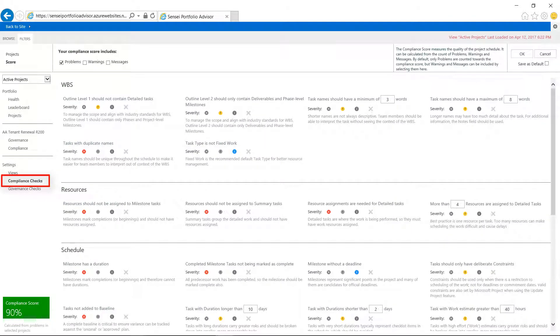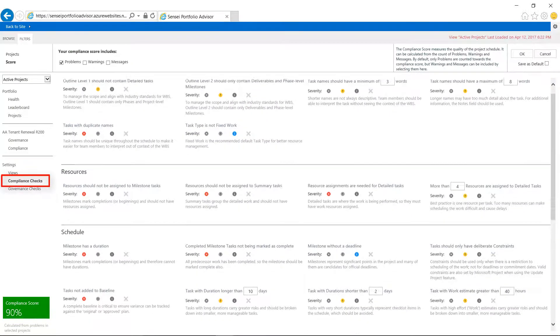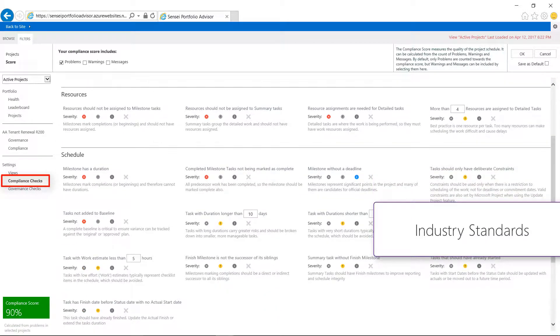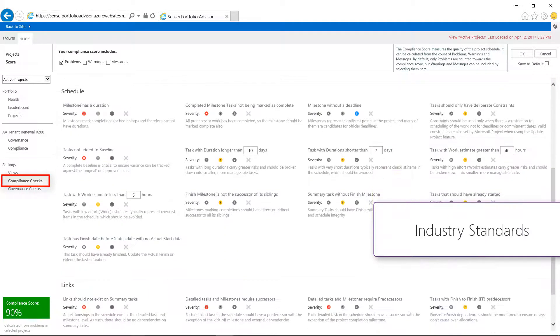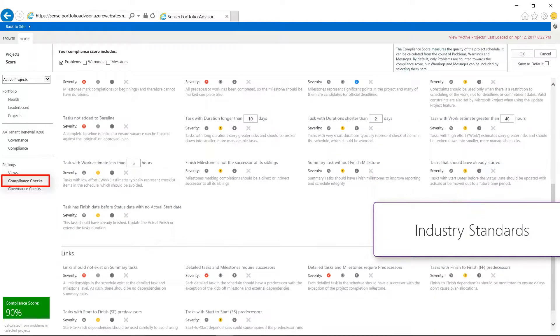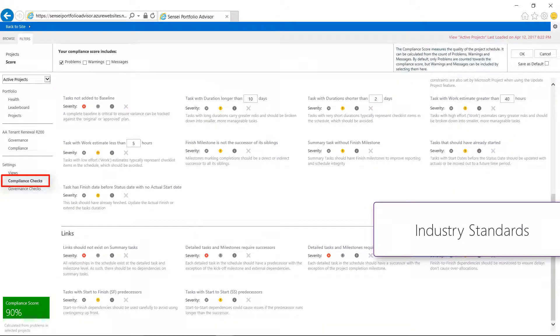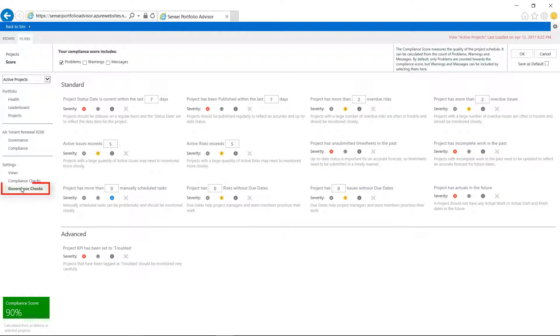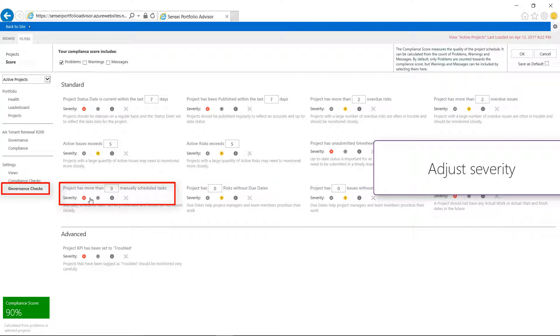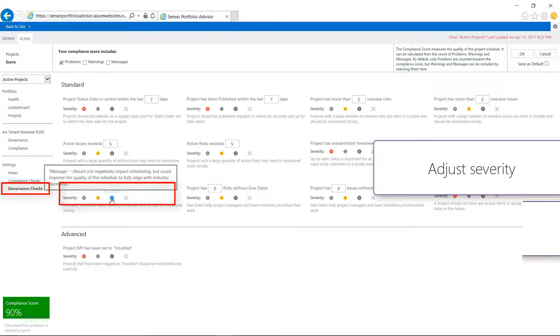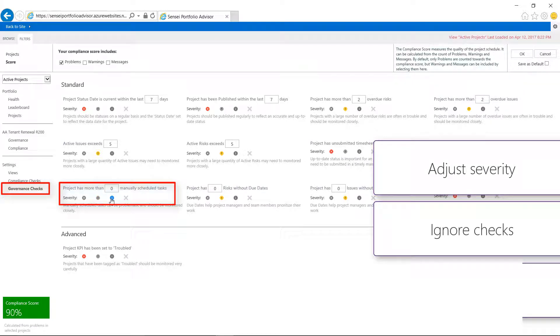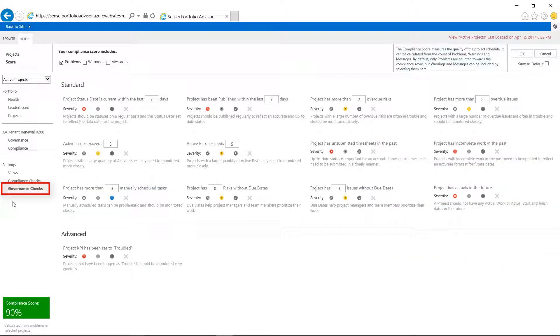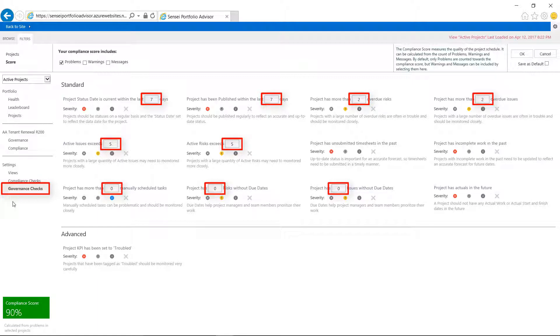The schedule compliance checks are based on industry standards from the Project Management Institute as well as generally accepted best practices. The governance checks are also best practices, and all checks can be adjusted to the appropriate severity level or ignored entirely if they are not relevant for your organization. Many of the checks can be adjusted to reflect specific tolerance levels and overall process.